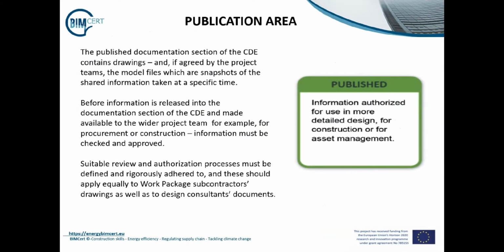The next folder is the publication folder. The published documentation section of the CDE contains drawings and, if agreed by the project teams, the model files, which are snapshots of the shared information taken at a specific time. Before information is released into the documentation section of the CDE and made available to the wider project team, for example, for procurement or construction, information must be checked and approved.